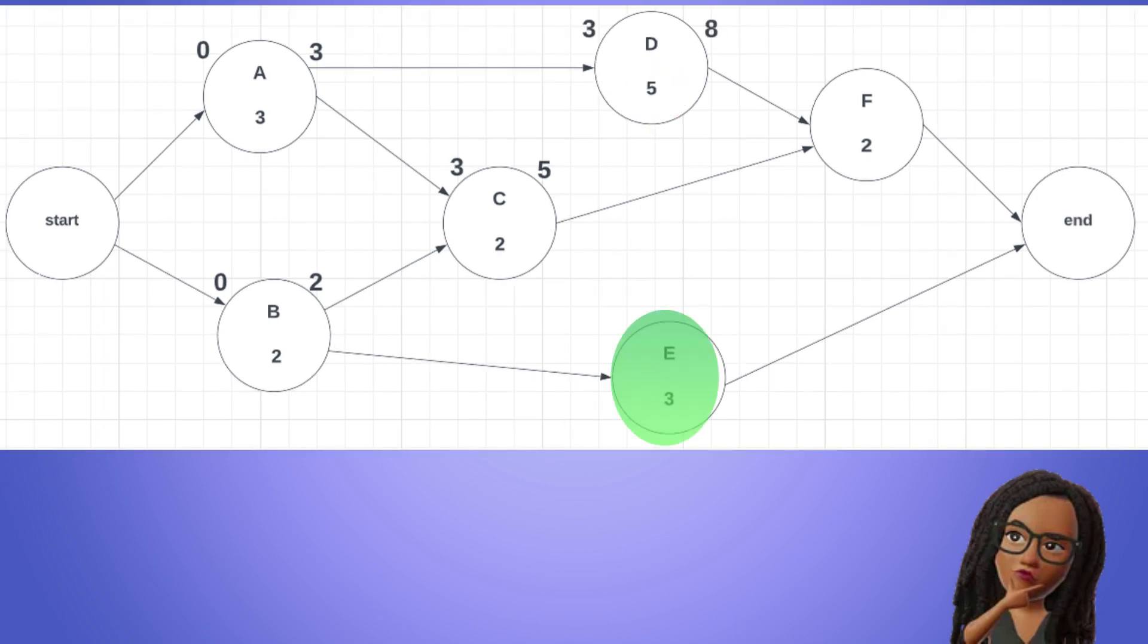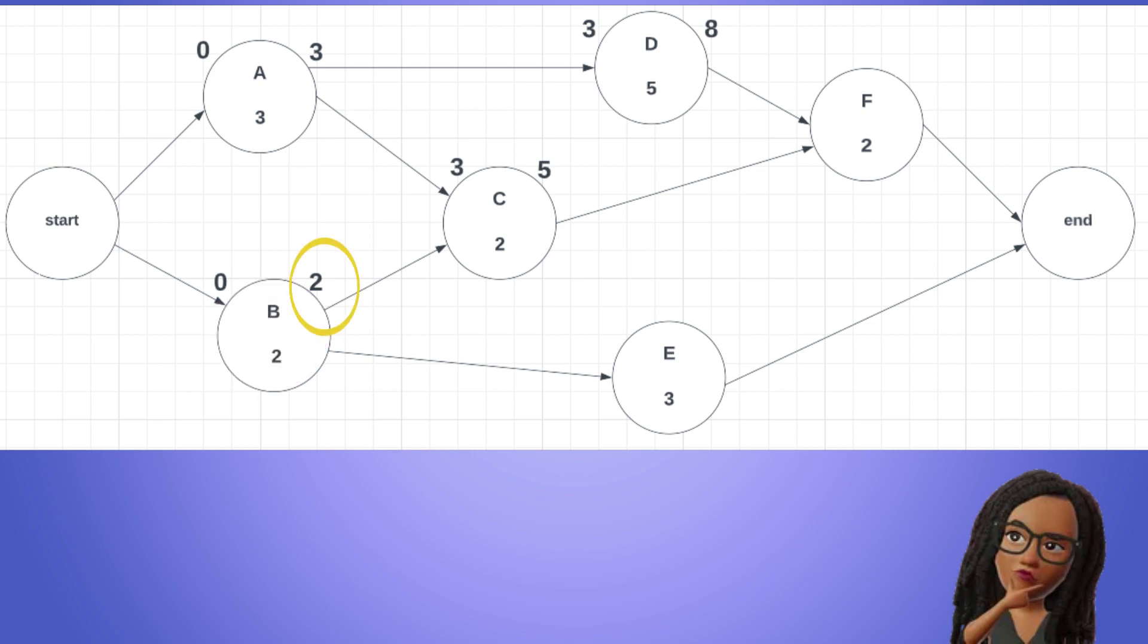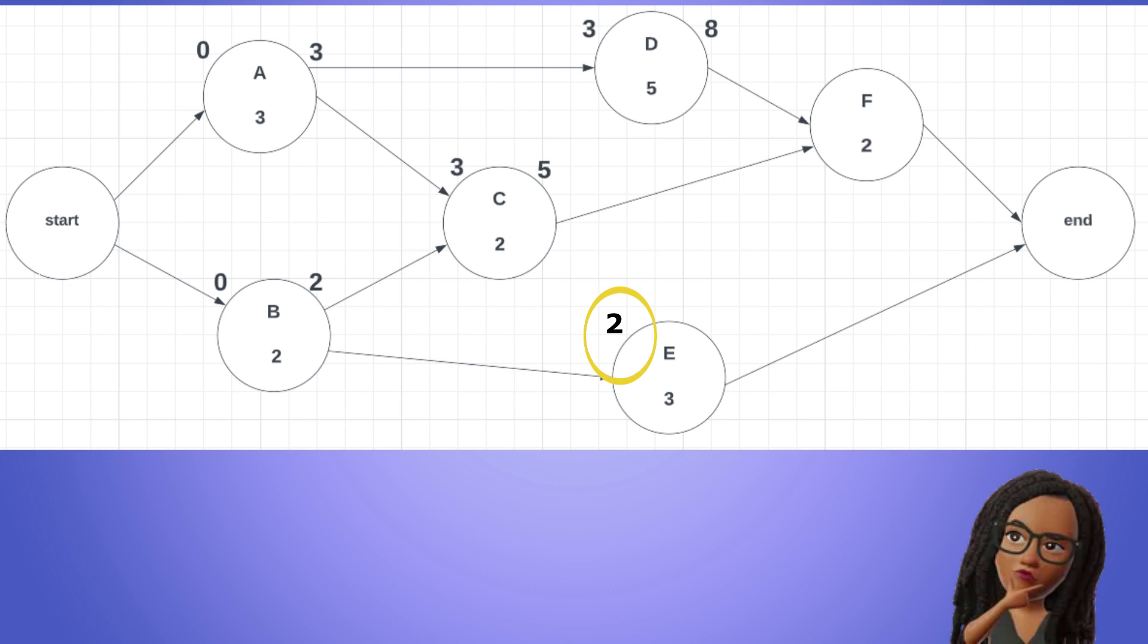E has only one predecessor as well, which is B. Therefore, it can start as soon as B is finished at time period 2. So the early start for E is 2. E's early finish is equal to 2 plus 3 equals 5.